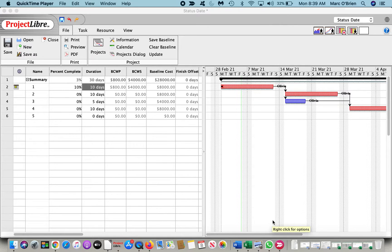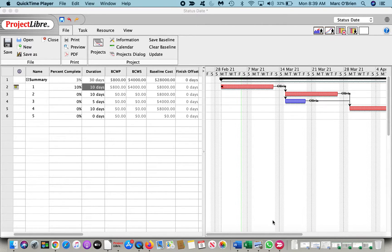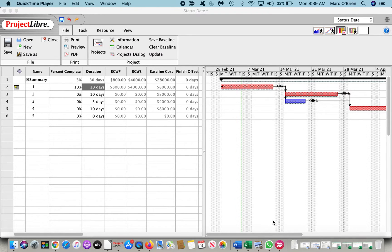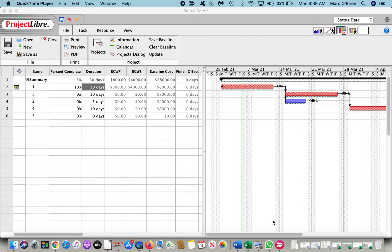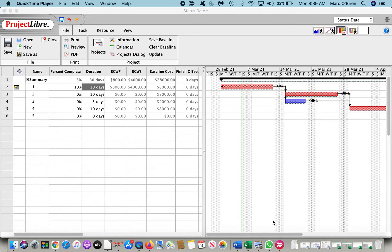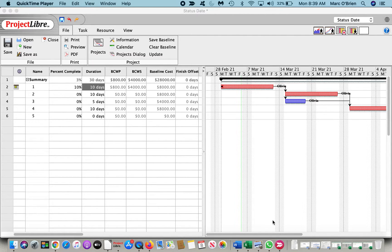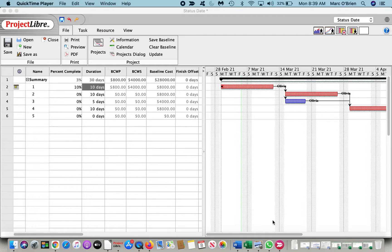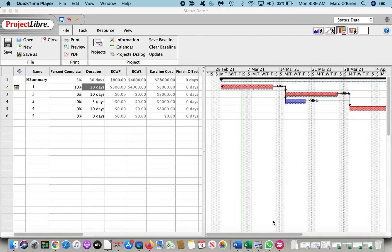So to recap, our task is baseline to cost $8,000, but that does nothing to let us know the performance so far. We set the status date halfway through task 1, and it tells us that 50% of the cost should be scheduled to be incurred at that point, which is our budgeted cost of work scheduled, BCWS. That tells us how far we should be in the task, but perhaps Olivia took a couple days off with her grandfather on vacation, so started late and is only 10% done. The task may not be over budget, as for two days there was zero cost, so we're still on budget, but we were behind schedule as noted by the budgeted cost of work performed. It's well below what was scheduled to be completed.